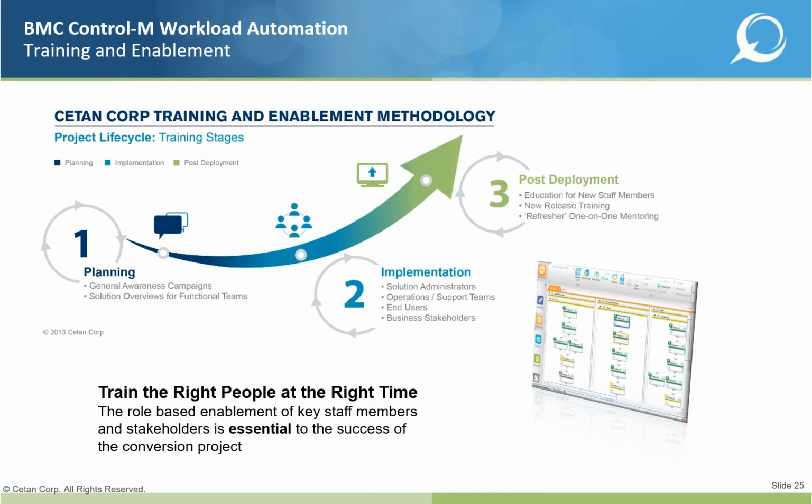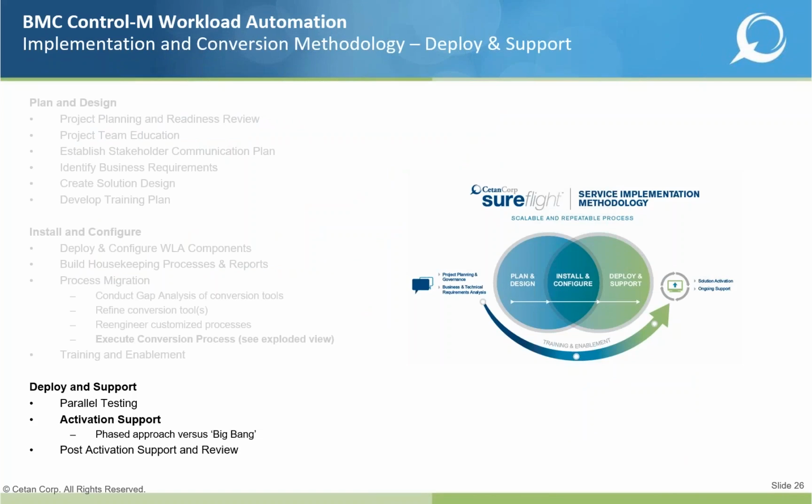And then when we get into the next step in the process, which does take us closer to the activation, that's really where we have to start getting into, again, back to the bits and bytes on what I'll call the final readiness reviews. And I've kind of broken it out on this slide to show you some of those activities, but keep in mind that this slide is really a summary of probably a 300 task activation checklist that has all kinds of gates built into it.